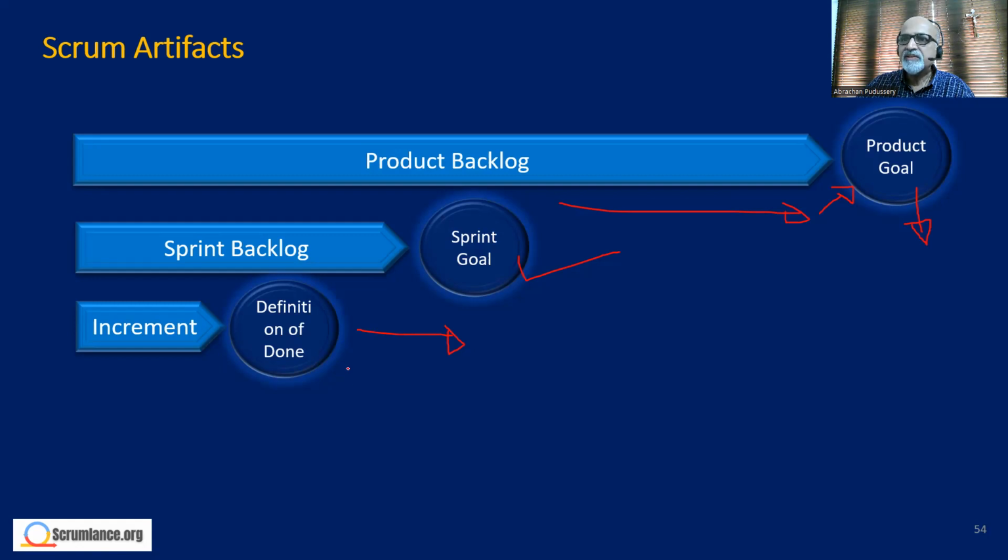So a common definition of done is very important. A quick explanation of definition of done would be: nobody will work on it again. It is ready for shipping at a feature level.